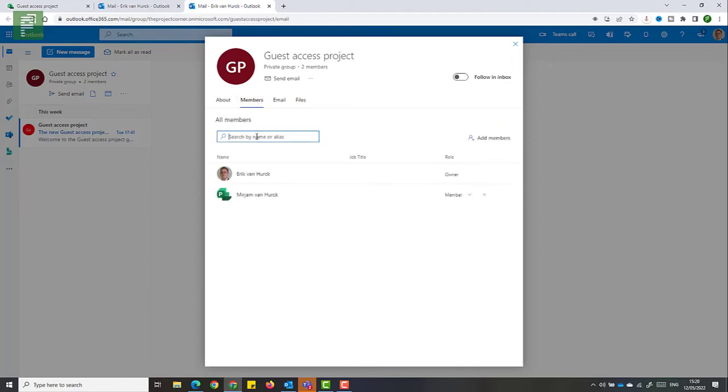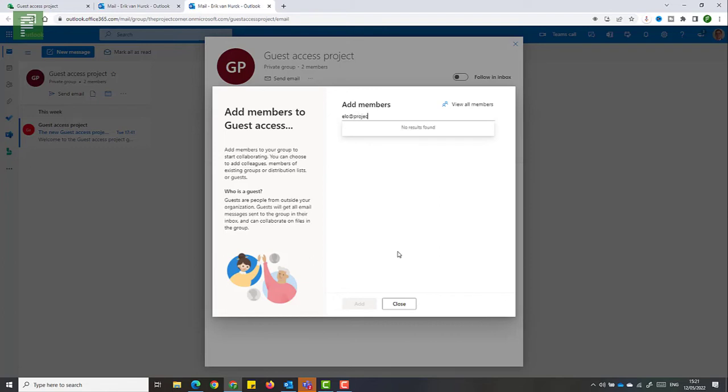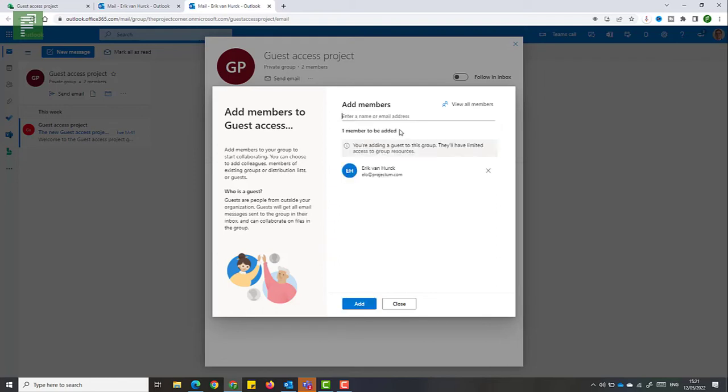Now, because your tenant doesn't know all emails from all external resources you could ever imagine, you'll need to use the email address of the external resource. And here I find that guest resource that we added to our project.